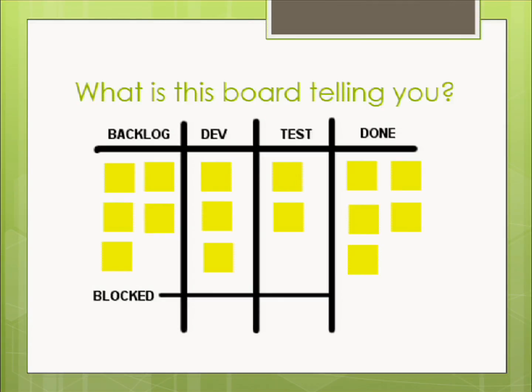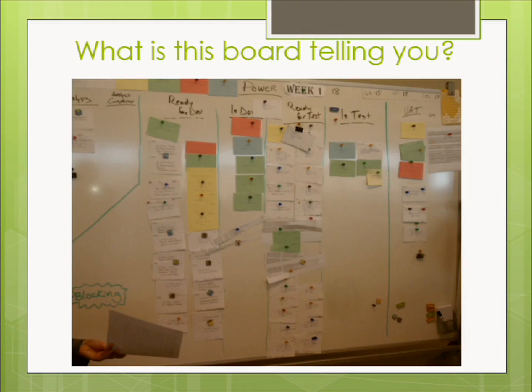So when I started on my current project, and this was 4 years ago, this was my board that I walked into. So, ready for testing? Right here in the middle. It's so stacked up that people were printing out lists of bugs in Excel and just putting the printouts up there. There was a serious problem here. Testers were 3 weeks behind the development in this project. So we had a big 5-week push just to get everybody caught up and to fix all the bugs. And that meant developers were testing too.